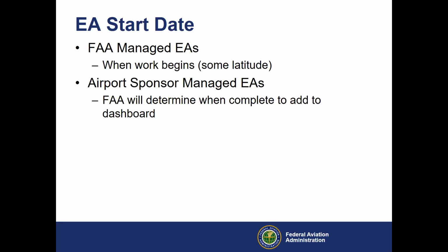Now, here in the Dakota, Minnesota Airports District Office, we have interpreted that to mean when the solicitation of views letters go out for those EAs. So, when the sponsor and FAA start coordinating with the agencies and tribes, that would be the start date of that EA clock. The EA clock, we'll talk about this more in the presentation, but that EA clock now is 1 year. So keep that in mind, pretty tight timelines there.